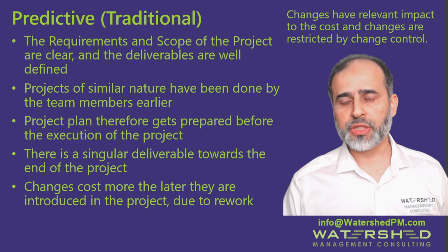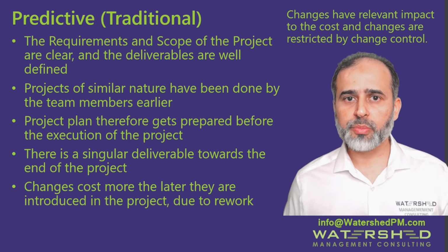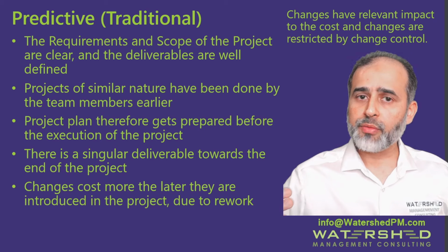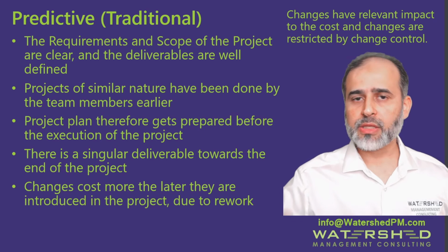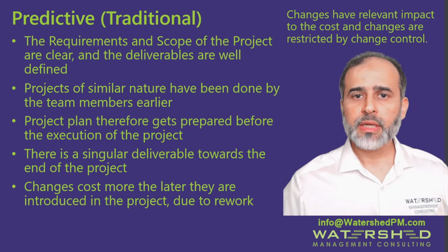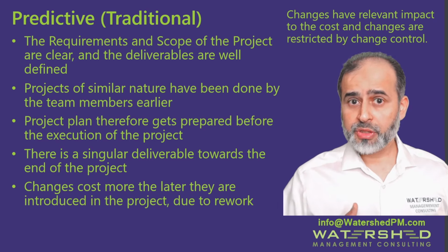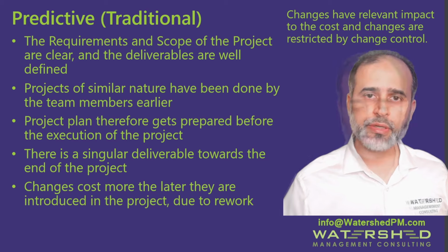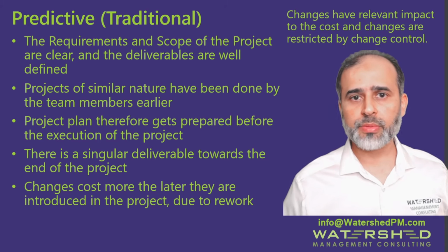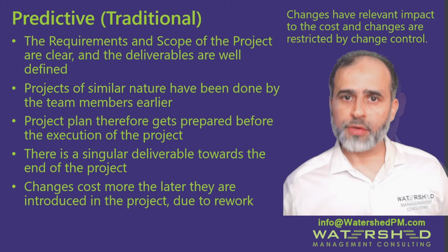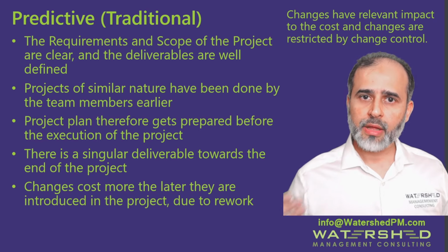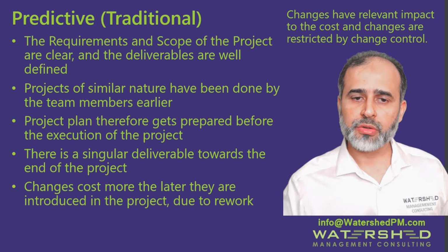However, if the same change is brought into the project by the time the planning is almost done, you would have to redo some of the plans, and that's going to cost more for the project. Similarly, if the same change is brought into the project when execution is already underway, then there might be a lot of rework to be done because of this change, and therefore the same change will cost a lot more to the project the later it gets brought in.